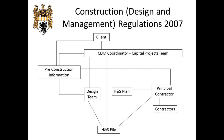Structured around that are the three main pieces of paper we have to produce. The first one is a pre-construction information pack, prepared by the CDM coordinator at the outset of the project. The idea is to provide information that designers need in order to design appropriately, and it also provides information for the principal contractor — things like power supplies, gas, and so on — which is then disseminated down from the principal contractor to his contractors. Ground workers, for example, would need the services section of this pre-construction information pack.